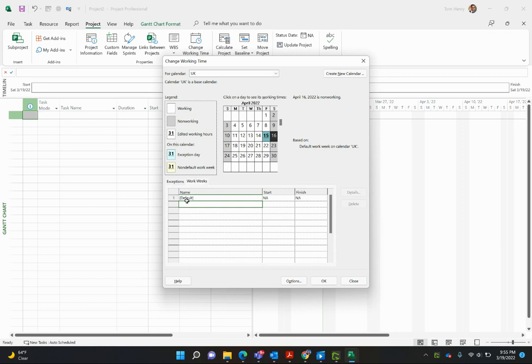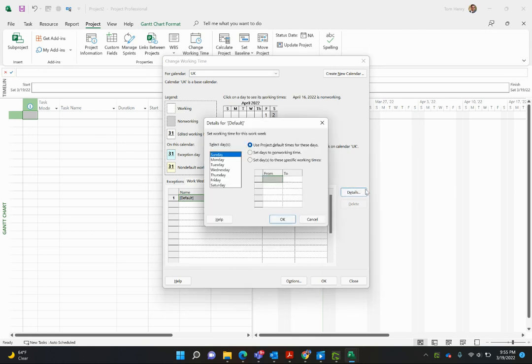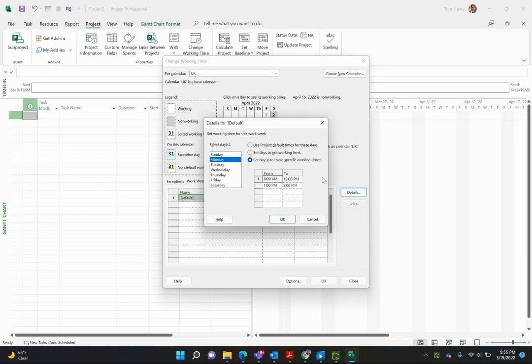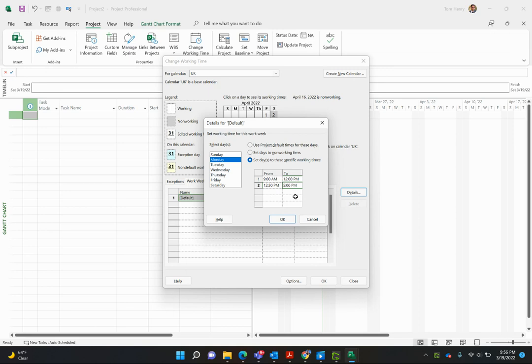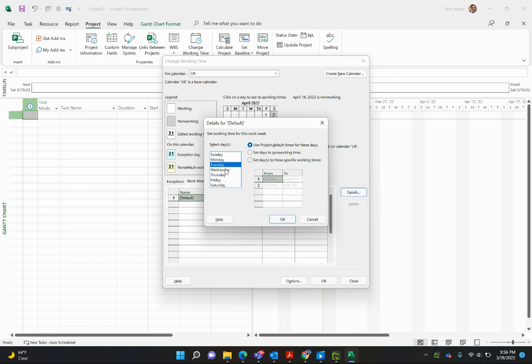Work weeks is what I really want to play with. Default is eight to five Monday through Friday. I'm going to click on Default and then press Details. I can say what I want my hours to be. I'm going to set these to specific working hours. So it's going to be 9 a.m. until 12 and then 12:30 p.m. until 5 p.m. So they get 30 minutes for lunch, finish by five. Nine to five, 30 minutes lunch. Those working hours there, you see it's seven and a half hours per day.